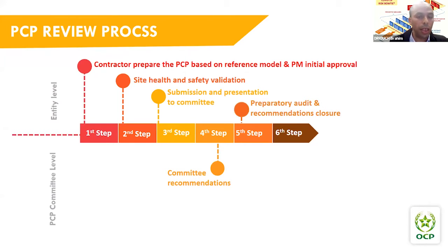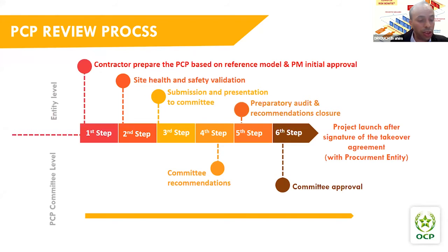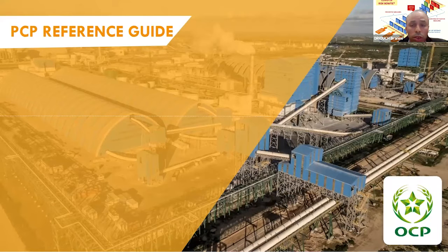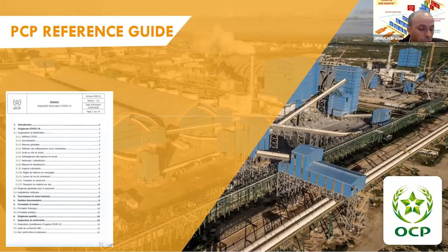After that there will be a preparatory audit, which is done on site, putting in place all the recommendations and actions to be aligned with the health requirements. Then the committee sends its approval after the closure of all recommendations. The starting of the project is conditioned by the signature of the takeover agreement, which is signed with the procurement entities. On the second slide, I will give you an overview of our PCP reference guide, which summarizes the set